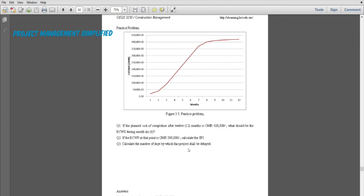This question is already solved and has three requirements. We have a graph showing how many reals have been spent and how many months. This is the time axis and money axis, and according to the S-curve this represents the expenditure of the project. The question says if the planned cost at completion after 12 months is 420,000 Romani reals, what should be the BCWS during the six months? We can get this from the graph itself by interpolation.